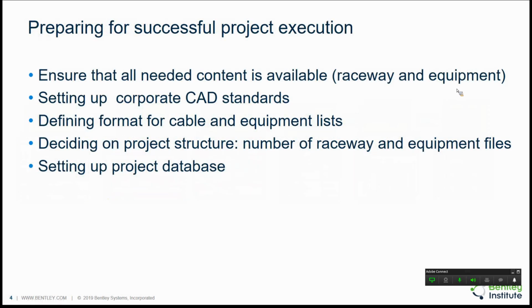But before we start working on a Bentley Raceway and cable management project, there are a couple of things that we have to do first to ensure successful project execution. Some of those steps are first to ensure that all content that we need for the project is available, meaning all specific raceway equipment catalogs are available to us. You would most likely have to customize Bentley Raceway and cable management to meet your exact corporate standards, CAD standards.